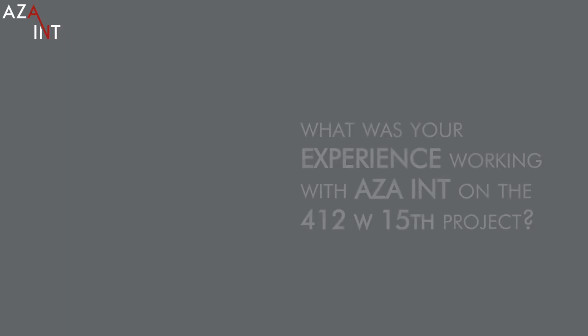Installation time is really a critical factor. So when you have one installer with a fully unitized curtain wall, as opposed to two different subcontractors doing two different types of installation, in this case it would have been a rain screen where you have to scaffold the building or drop, which they did not have to do when they proposed unitizing all of it. So it's that time that's saved, and obviously the time is the money factor.